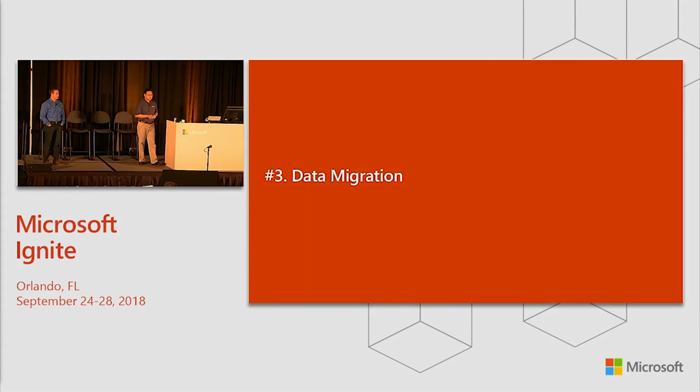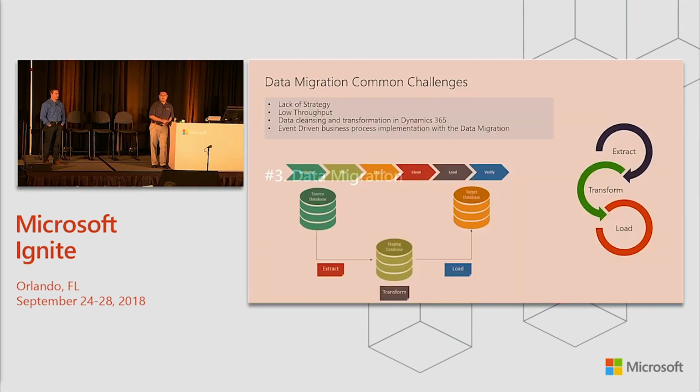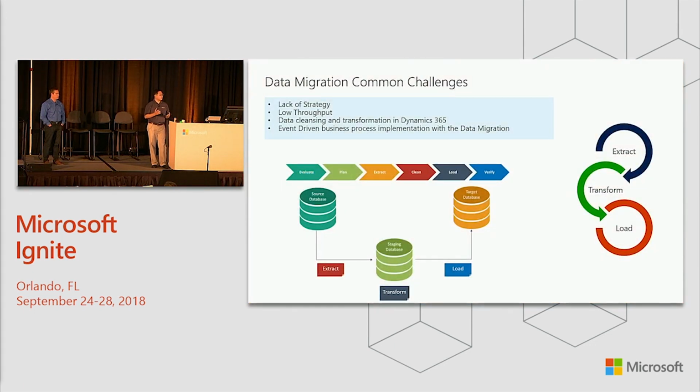And then I think the next one is data migration, right? The reason that we brought up data migration is that we have a lot of customers we've been working with, and a lot of challenges that we have seen. It's about the go live. It's being impacted because, with data migration, they cannot get all the data in on time. If they're going to move millions of records, they may say, hey, you know what, we only did it through the weekend. It's not really realistic sometimes, right?